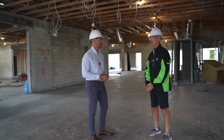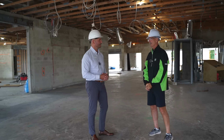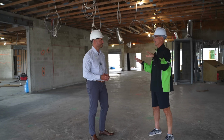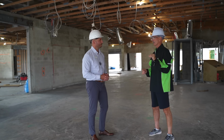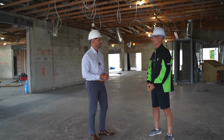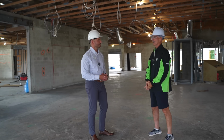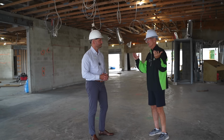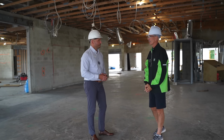And by October 1st, I would say safely, all the site work will be done, will be paved. We're not going to stripe till the end, because the contractors are still running over this paving. But the site for 6 to 8 weeks is in total turmoil. It's kind of a war zone in both locations.